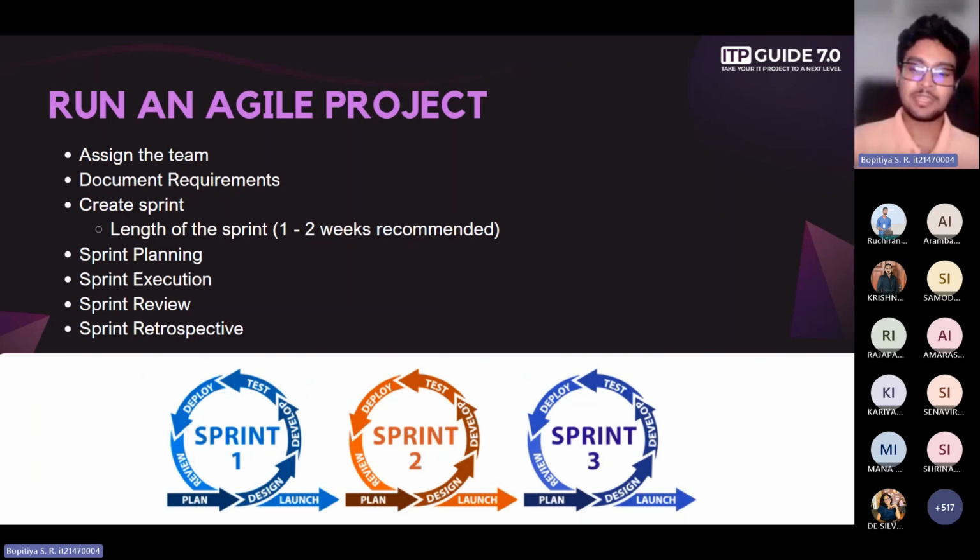So what do you do? You take the stuff that is remaining to the next sprint. And if it's not completed by that sprint, you take it to the next. Ultimately, those items will never be completed, and most likely you will not start implementing them. So my recommendation to you is only take the ones that you can complete into the sprint, start executing the sprint, do the development, and go ahead.